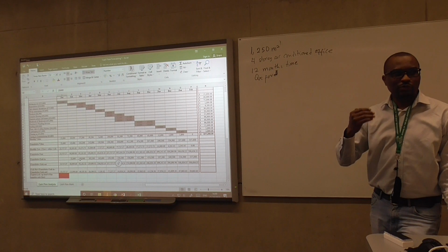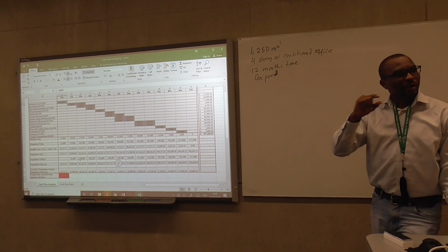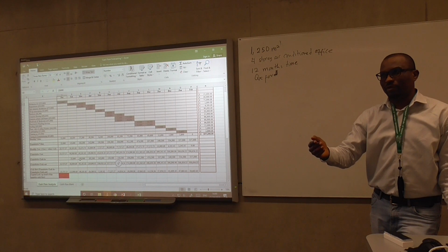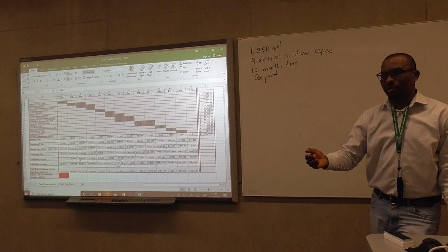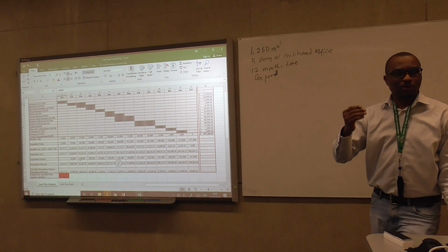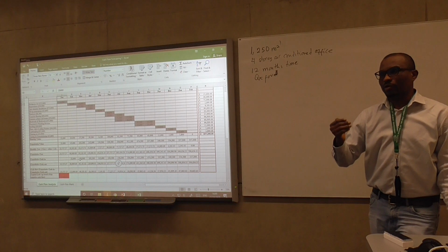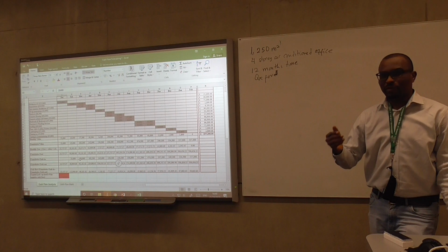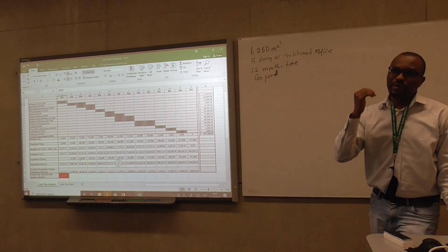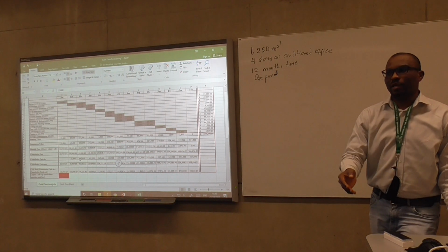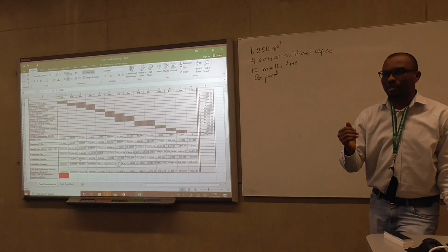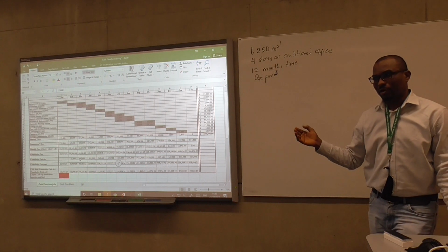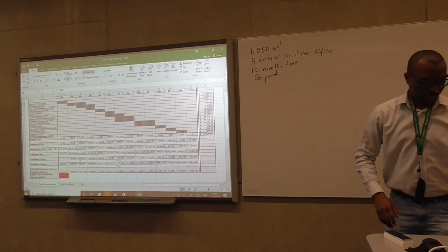And then you're able to tell the bank that, okay, in the coming month, we will need maybe 200,000 pounds from you or 300,000 pounds from you. It helps you in terms of planning. And once you know what the bank is giving you, you're also able to estimate your interest, because for most banks, as and when they give you the money, the interest starts kicking in. Once they give you the money, they start charging you some sort of interest. So you need to be able to do your cash flow and get to know what happens in there.